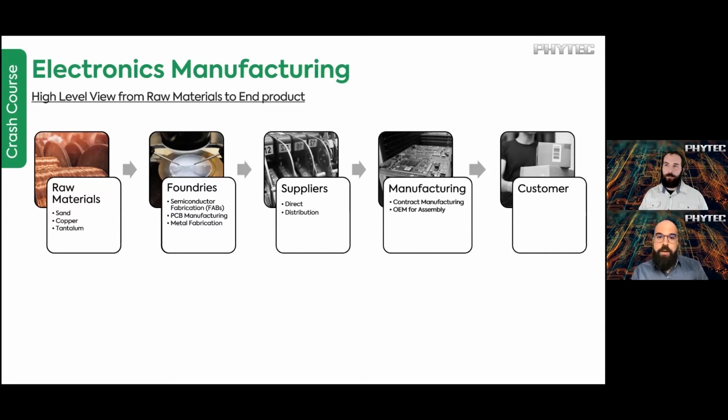So once we are at the foundry and we have it shipped to the suppliers and distribution channels, it will be processed and then routed through the manufacturing facilities. At the manufacturing facilities, we are moving forward and using the design you made. And there's the step where you think parts appear, then this already kicks in. So until you are there, 30 plus weeks are already done until we as a SOM manufacturer can use those parts to build our SOM to then ship it to you as a customer.